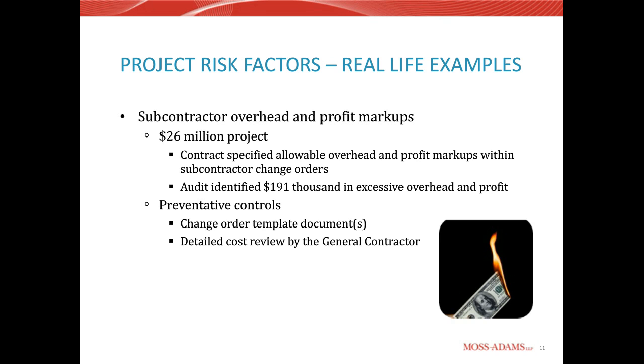A lot of times what will happen with documentation is it's filled out by a subcontractor using whatever system they typically would use. But on any given project, they may have different markups that they're allowed depending on whatever their contract states for that particular project. If they don't update that for your specific project, that's where the risk comes in that you may be overcharged for something unintentionally, due to however they manage their own change orders.